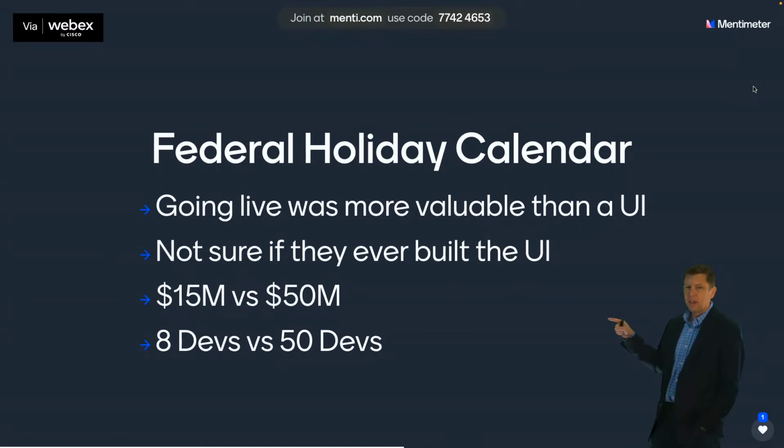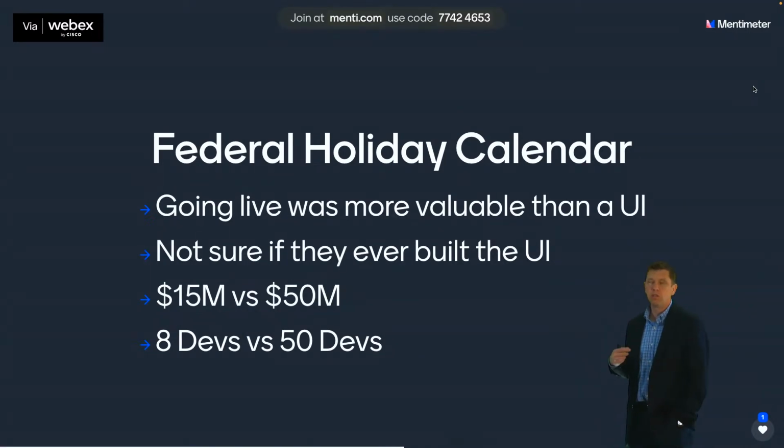As a result of that, they were able to take this project that was quoted at $50 million to go live, and go live with it for only $15 million. And they did it with 5 to 8 devs instead of the 50 devs that had been predicted. It was massively successful, and they were able to dramatically lower risk.